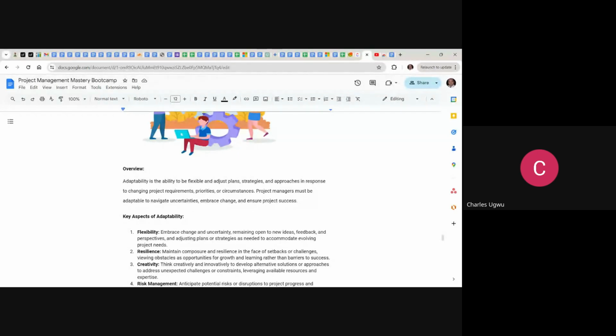When changes come, capture the change, evaluate the change. I told you to have an evaluation board. In a project, you need to set up an evaluation board that evaluates every change that comes in and looks at the impact. Do your impact analysis. Understand the impact.